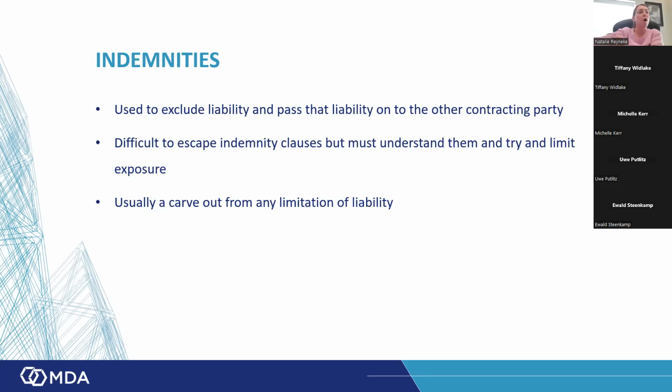But from a common law perspective, if there is a causation element where the loss is caused by the contractor, then there would be a direct link between the loss sufferer and the contractor. The employer would simply say, I'm indemnified under my contract, seek your remedy from the person that caused the loss. If there's no link, then it would have to be a contractual claim with no guarantee of success, unfortunately, if there's no money.